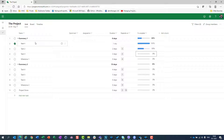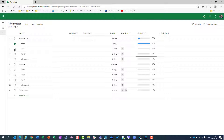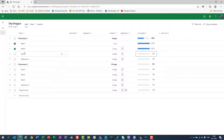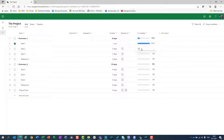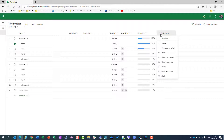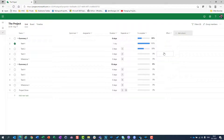Another way to mark a task as complete is to click the check box — it will show as 100% completed. But if you uncheck it, it will go back to 0%. So don't forget: if you had 50% entered and then click the check box to mark it 100%, and then uncheck it, you will not get back to 50% — you'll need to re-enter it manually.